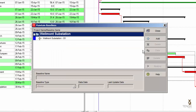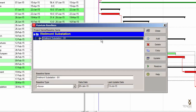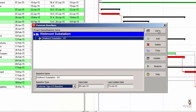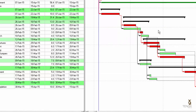Quite quickly, it makes a copy of the project and there's our baseline. If I click on this, I can make some edits in the lower portion of the screen. We could change the name — I'll leave it at B1 for this. Baseline type — these are some labels. If you've loaded the sample data, you'll have a similar list. Let's go with Customer Sign-off Baseline, and close that.